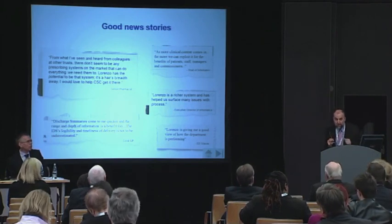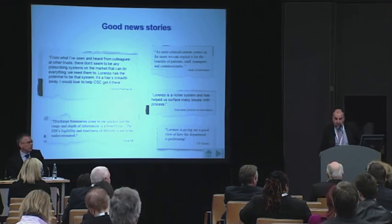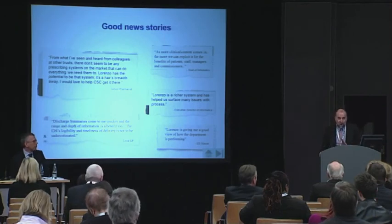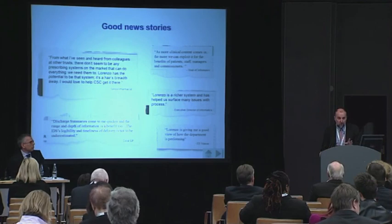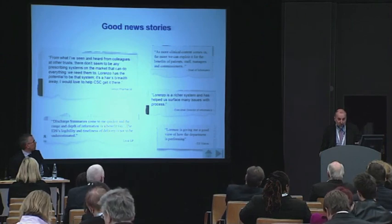Yeah, lady at the front. Have you systematically evaluated the changes in productivity as a consequence of introducing the system? We haven't done benefits anywhere near as well as we should have done or could have done, and I think one of the things we have noticed through the structured interviews that we've done after we've gone live is that we didn't baseline everything that we should have done.